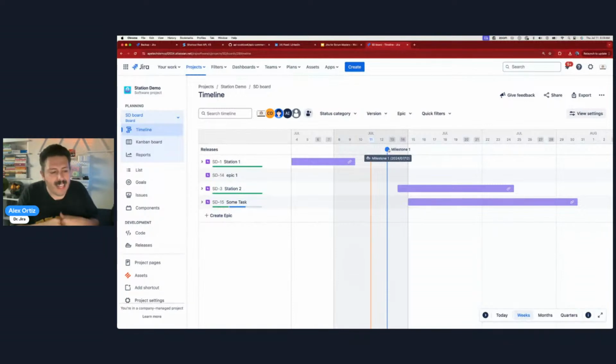And this is critical because as a Scrum Master, when you're trying to figure out, again, what should go into a sprint, what needs to be in there, right? Well, these milestones, releases, which again we're going to get into a second, they help charter that discussion, right? Because when you know that you have a looming deadline coming up, and you know that, hey, by this date we got to get a lot of stuff done, well, it's easier to work backwards, right? So it's easier to now take, okay, we know everything that needs to be finished by a certain date. Let's plan our sprint accordingly, right?